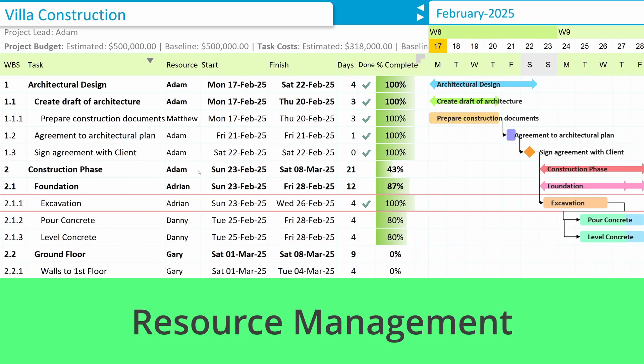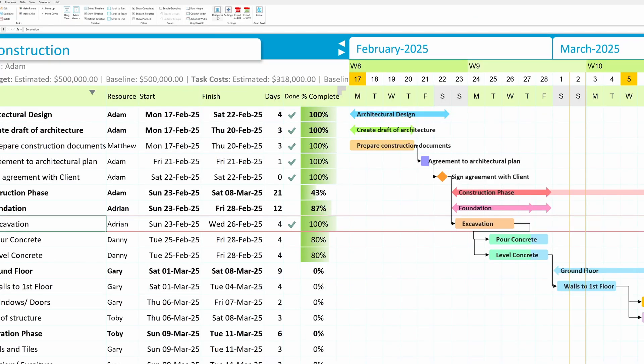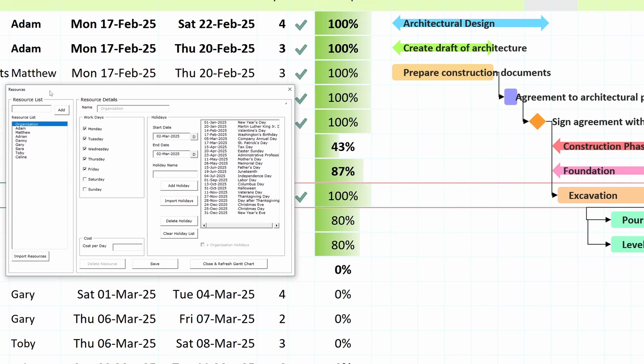Resource management. Manage resources effortlessly with the resource module. Assign workdays, add holidays, and let Gantt Excel handle non-working days and your date calculations automatically.